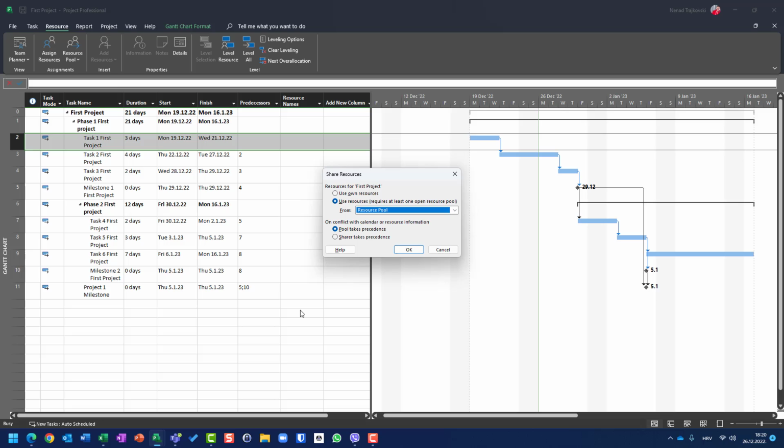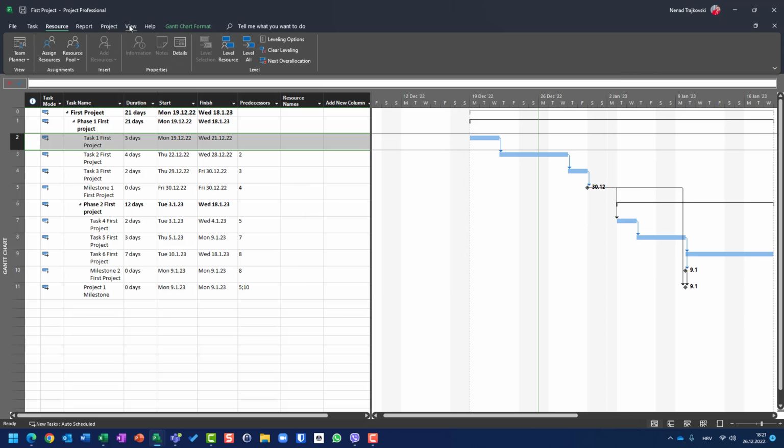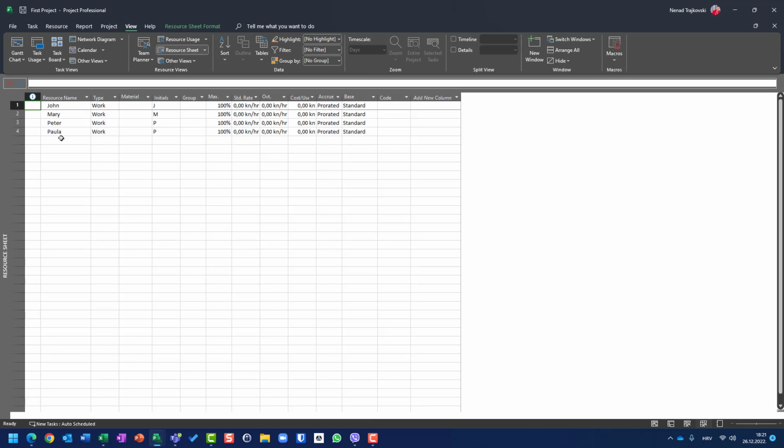The best tip is that you should use pool because it is easy to maintain, except when you have some exceptions for some projects, then you should use sharer. Sharer means use the local calendar for a local project, and pool means use the calendar for the pool.